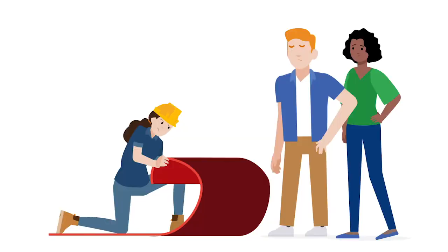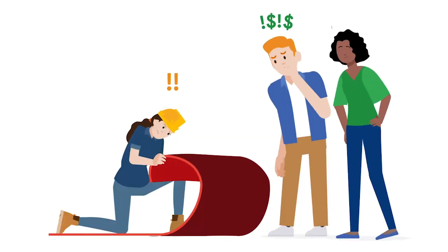Changes should be measured against the baseline estimates of scope, budget, and time allotted for your project, given the original requirements. Be mindful that when you change any one of those things, there may be knock-on effects, which could be positive or negative. For instance, your clients may believe they have beautiful hardwood floors hiding underneath old living room carpet, and want to pull up the old carpet and use the original hardwood floors underneath. You, the project manager on this particular construction job, have budgeted to have the carpet removed and the old floors sanded and stained. Bad news, you pull up the carpet and find that the floors are in bad shape and rotting. They'll need to be replaced or repaired, which could be costly. So your timeline and budget are likely to take a hit.